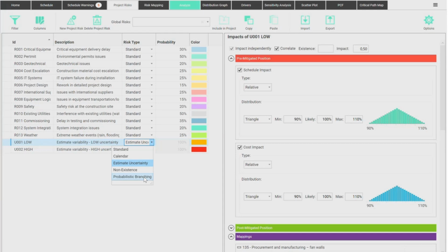In the risk analysis of the bidding process, they include some probabilistic branching rules. For example, if there are fewer than 3 candidates, they will need to start the bidding process again for a longer time to attract more competitors. Sometimes there are rules in the law that require you to do that.